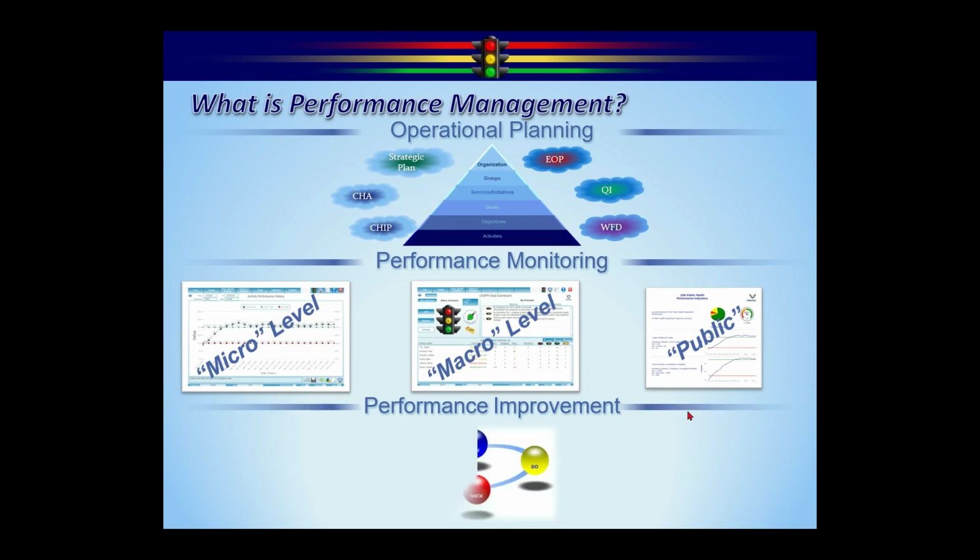And the reason we do the performance monitoring is, remember, in that do phase, we have that real-time planning where the emails go out to you guys and you fill in the information on the emails, or you go back into the system, fill in the information and keep it updated here. That's where the information for performance monitoring comes from, is your updates to the plan here. So the reason we have those updates, obviously, is so we can check to see how we're doing, checking the plan against the actual, and then if necessary, making the adjustments in there.